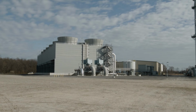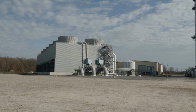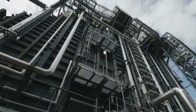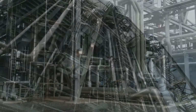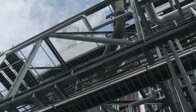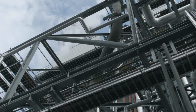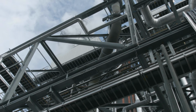When a failing mechanical contractor was removed from the site by our client, Riggs Distler was awarded the work of completing the construction of a steam turbine generator, turbine building, lube oil building, structural steel platforms, and 20,000 feet of miscellaneous piping systems, as well as critical piping systems such as main steam, hot reheat, and tie-ins to the steam turbine. This project is currently in the final stages of completion and has been ongoing for 1 year and 8 months. The base contract value was $14 million. This project at completion will exceed a $30 million contract value.